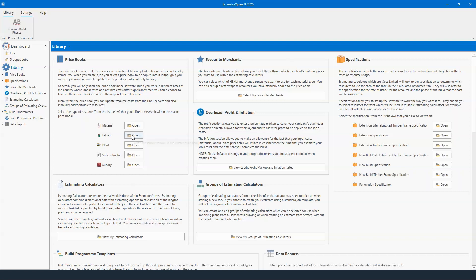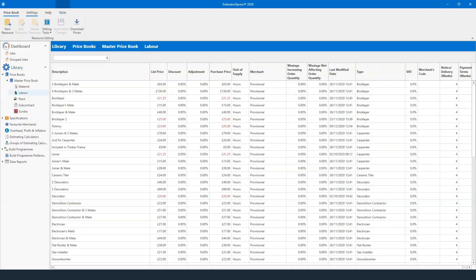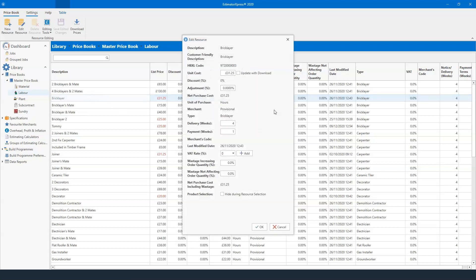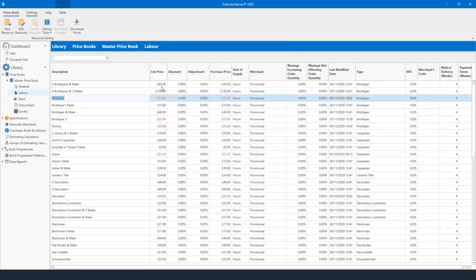Back to the library, we have your price books on the left-hand side — material, 3D sundry — and if I click labor, you'll be able to see the list of tradesmen we have within the software. So you can see two bricklayers, bricklayer two, and even one called Tommy. You can change all the pricing of your tradesmen with a double click. So 31 pounds 25 breaking into an eight-hour day works out at 250 pounds a day. If I change that to 25 pounds an hour, that's 200 pounds a day — and that's now time-stamped to the last time I changed that price.